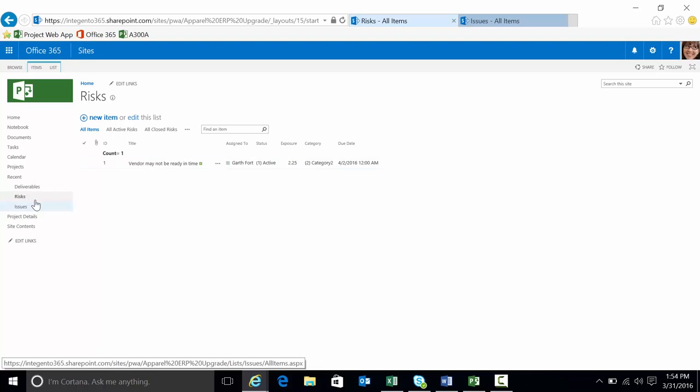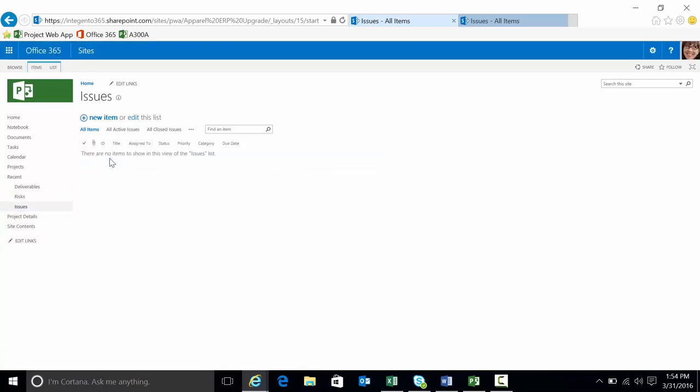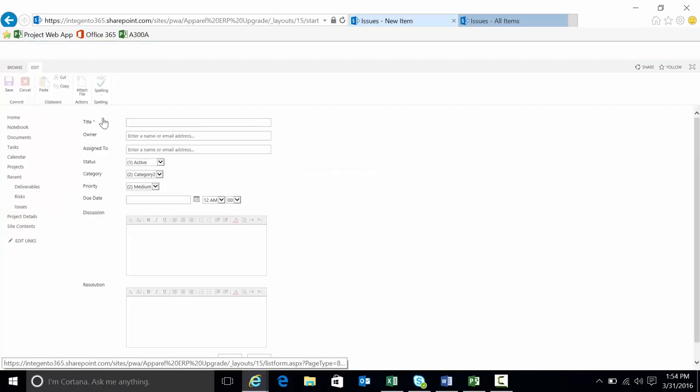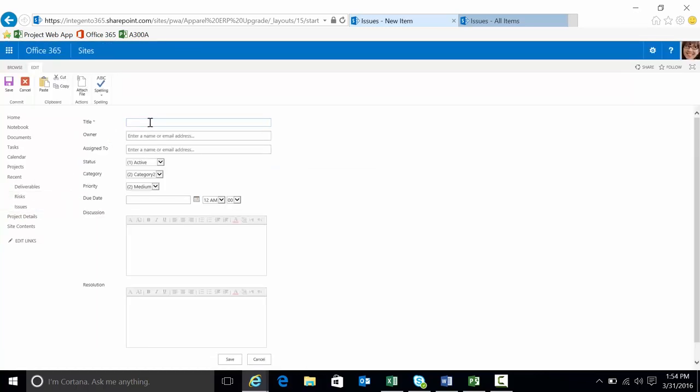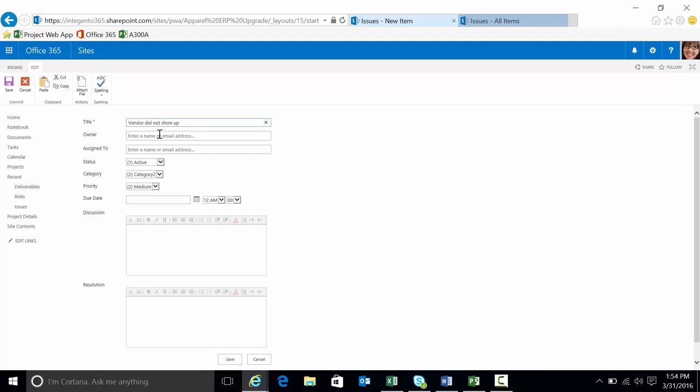I'm going to create an issue as well. The difference between a risk and an issue is actually an issue is something that's currently affecting the project. A vendor did not show up. And again we're going to assign it to the same person.